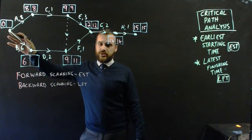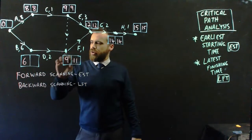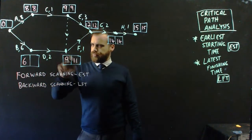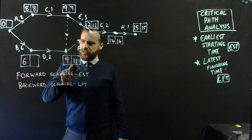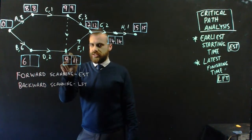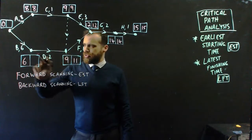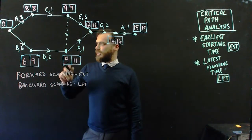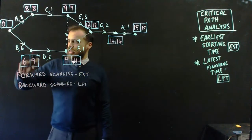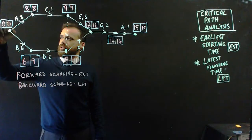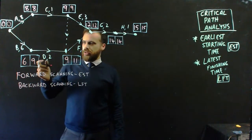And you're still thinking, well that is a waste of time. What about over here? So eleven, if we subtract two from eleven, because that's the latest finishing time to get to this vertex, eleven minus two would be nine. Alright, and then here we just write in zero, because that is our starting time.